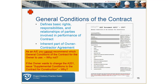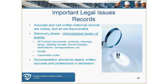With supplemental conditions, if the owner wants to change or modify something in the A-201, make sure it is written down and documented. As a lawyer, I review from the very beginning of a project — architectural drawings and specifications through the permit process, all the way through construction and even after. Documentation in a clear, written, accurate, and professional format cannot be overemphasized. Even if you're typing an email, imagine how you'd feel if that email were read aloud during a deposition.